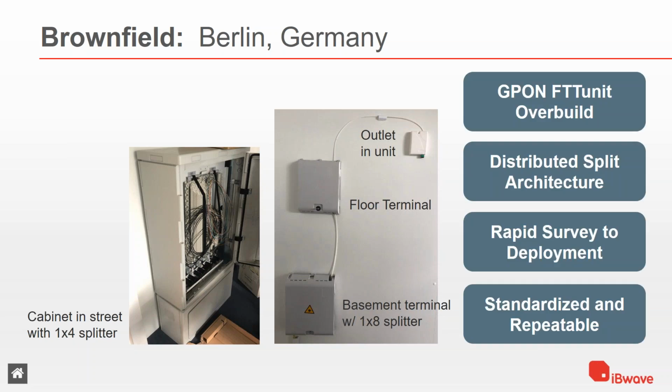But having a standardized product set and repeatable procedures is going to be critical for the large scale deployment. Also, access to the buildings is limited, so being able to rapidly move from the survey phase to the deployment phase is going to be important.